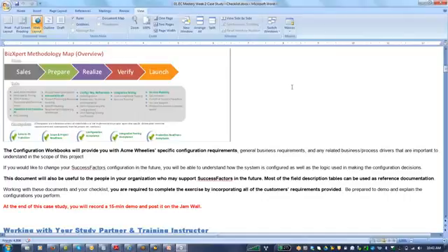So this is the typical... What is the typical duration of this project? It depends. If you are implementing only one module, it is done very quickly over a period of 3 months. If it's multiple modules, then probably up to 6 months. It again depends on how soon they want to go live, and on the business requirement. If they are in a hurry, it can be done in a hurry as well, and if they have flexibility, then it can stretch up to 6 months.